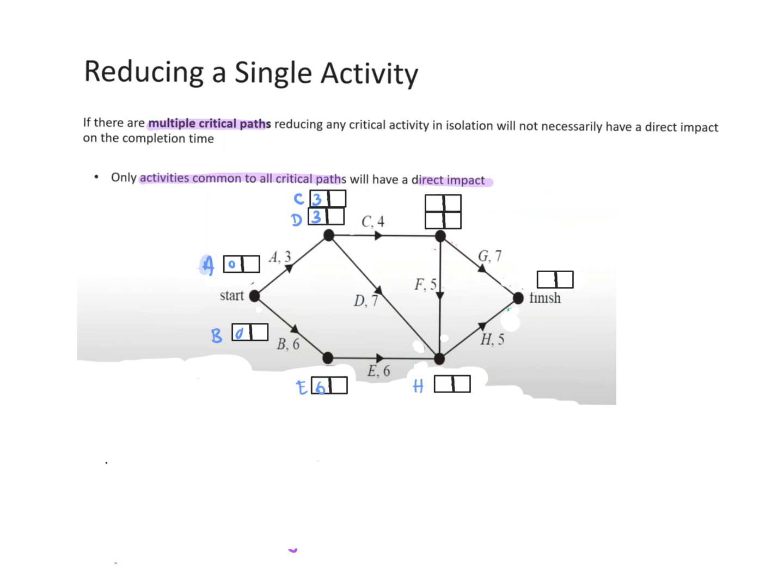So I'm going to go along up the top. If I go along the C method, you can see G is also there and F is over here. If I go along C, which is a precursor for F, we need to do 3 plus 4. So these ones are 7. Now, if I came down this way, the 7 plus 5 would be 12.